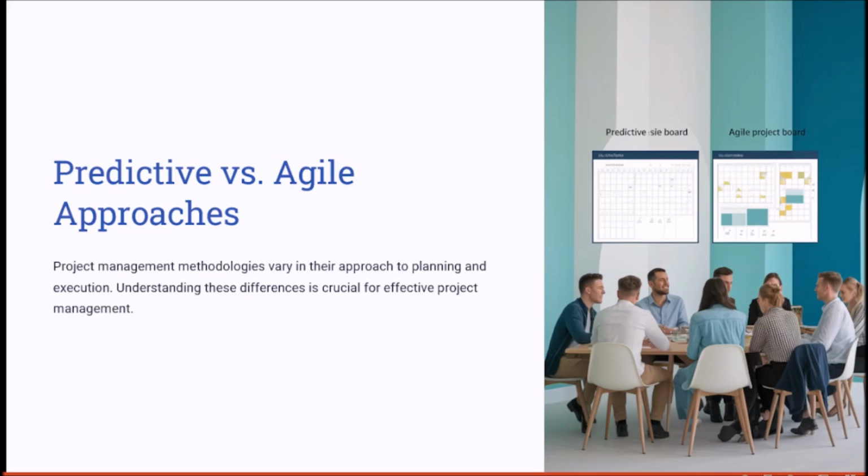This methodology is best suited for projects with well defined requirements, strict deadlines, or high predictability. So you know the scope and you know what you are planning to do, and you don't have any, let's say, stakeholder feedback required to make changes in the scope. Extensive planning, scheduling, and assessment are performed upfront, ensuring that each phase is carefully mapped out.